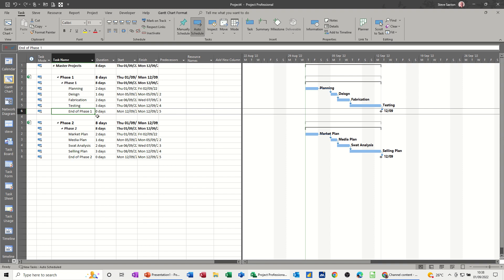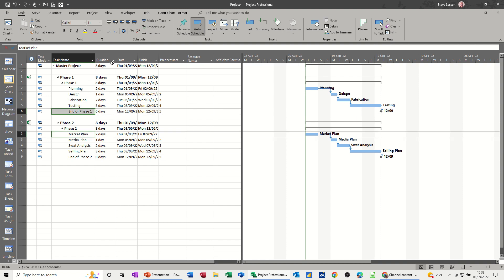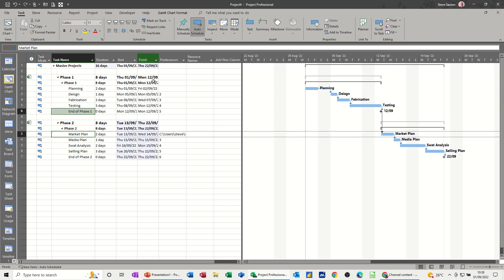Basically, what you do is click on that one, hold the Control key down and click on that one, and then just click the Link button. And then it shifts that project along.